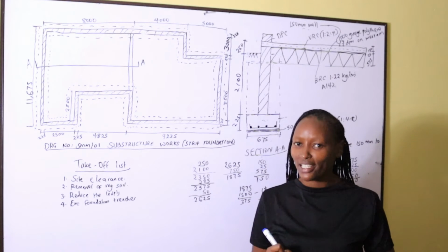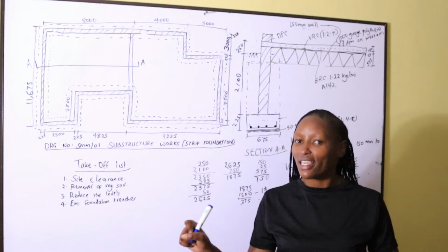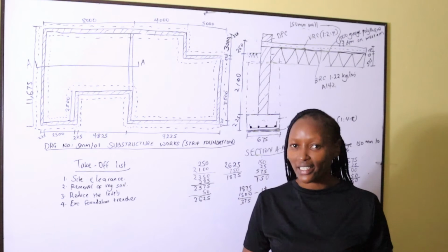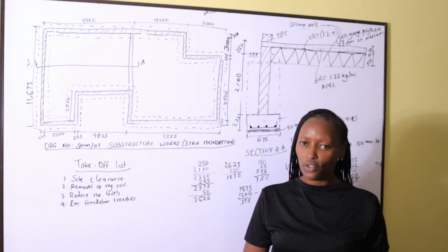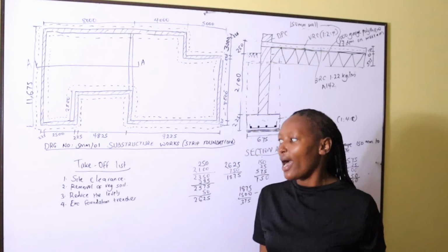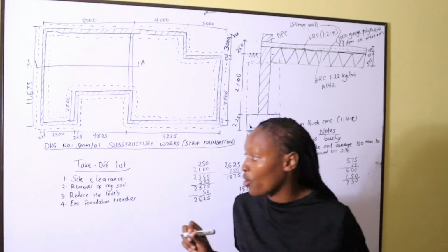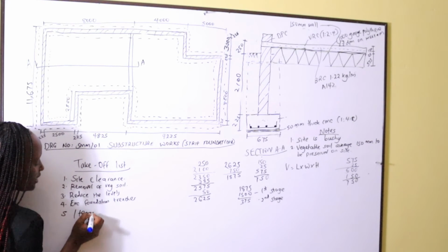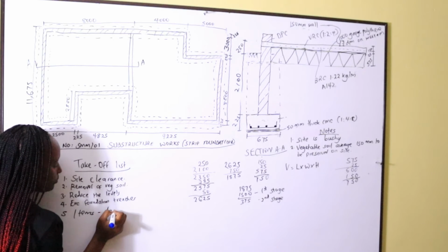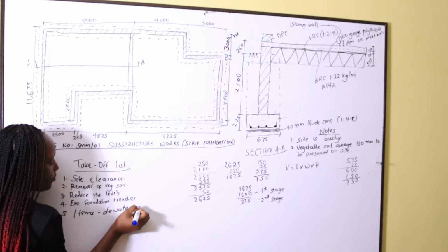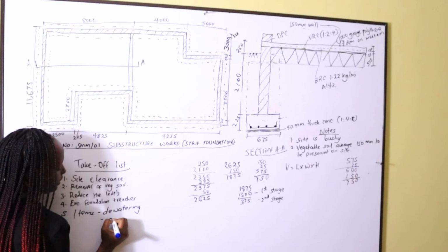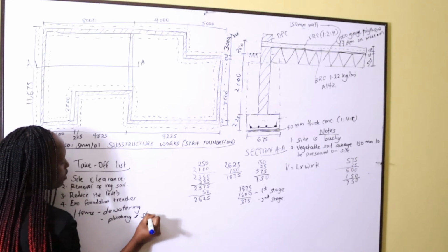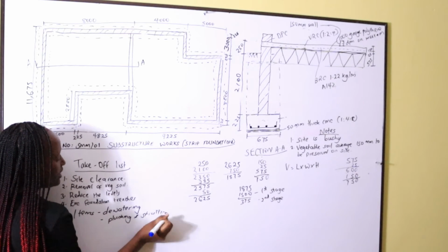The full extent of the work shall be known on the site, all right? But now we need to allocate some money just in case we shall do the dewatering, just in case we shall support the walls of the foundation trenches. So in the taking off, we usually write items. The two items that we shall measure are dewatering, removing the water from the trenches, and also planking and strutting. Planking and strutting is the support to foundation trenches. These two items, we shall write item.